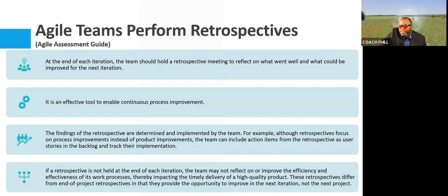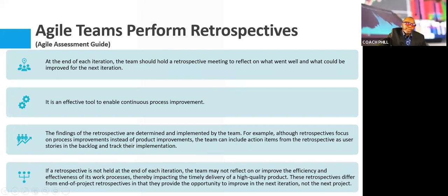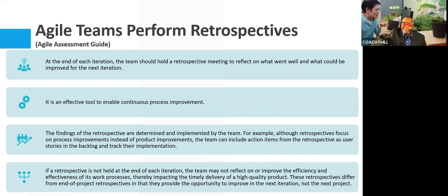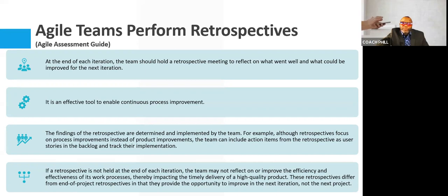These retrospectives differ from end of project retrospectives or lessons learned, if you want to call them that, in that they provide the opportunity to improve in the next iteration, not the next project. You see, that's the problem with lessons learned. We talk about, oh, what are we going to do next project? No, this is the next iteration. In fact, hey, it's even what are we going to do different from now? So you want to find those opportunities as quickly as possible.